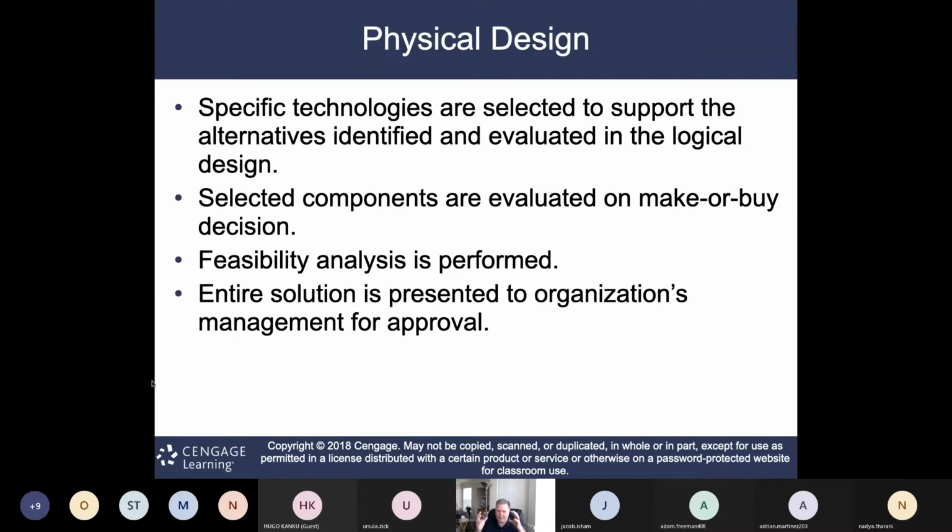But you at least put it all together, you package it together. This is the best case, what we're thinking. And then you go up for management approval of the designs. Hopefully they've taken advantage of security areas to review some of the high-level designs and sign-offs, so that yes, this is something that's going to be approved in your organization too. This is where getting security involved earlier versus later is always best.